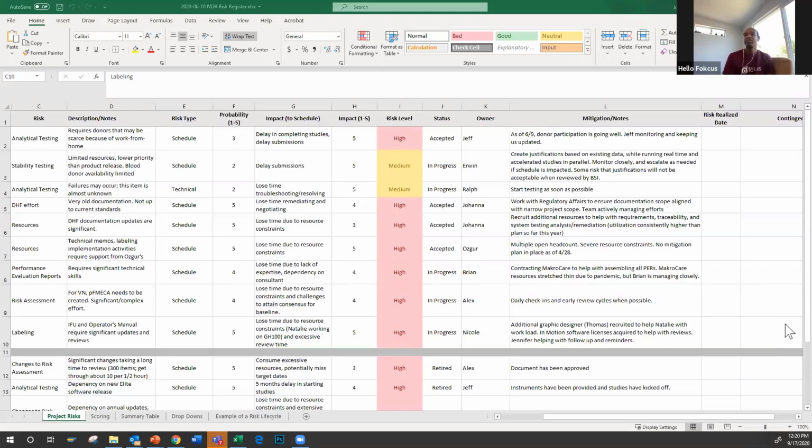If you have a really small or quick project, you really want to watch these risks, because if you run into a technical thing that takes 3 weeks and you only have 3 weeks to do your project, you have a serious problem. So you want to find these risks and see if you can find workarounds for them as early as possible. And if you all want this template, I'll clean it up and share it with you.